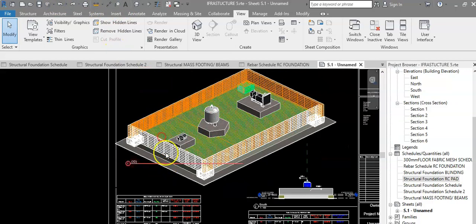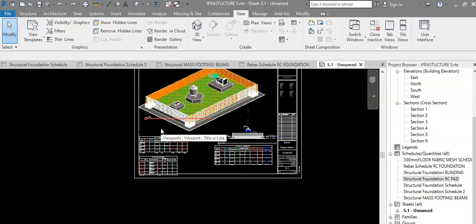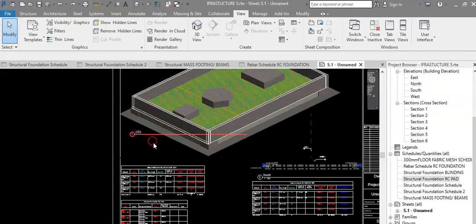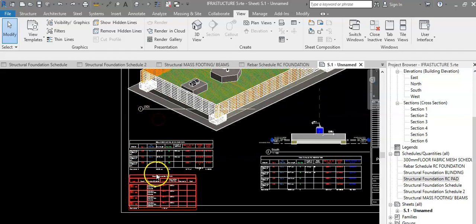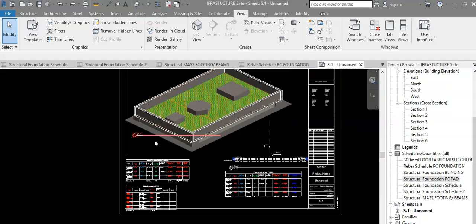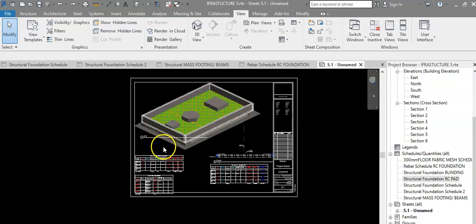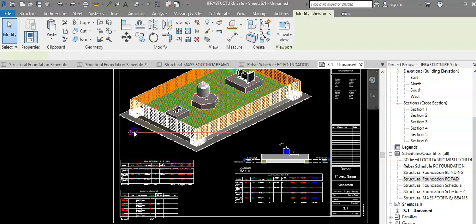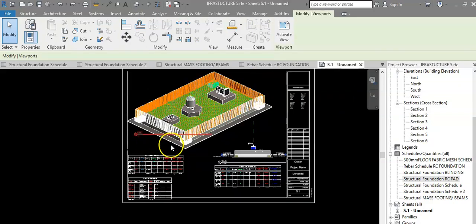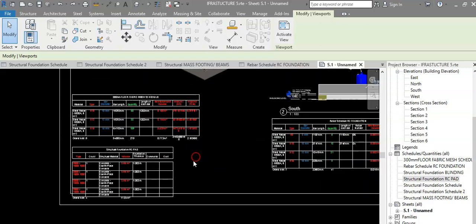Well, this will prevent recalculations and tracing all the new and updated drawings to update the schedules and volumes associated with it. So that means any member of the team, whether it's the designer, the engineers or the quantity surveyors who are using the model, any changes to any item will reflect instantly and dynamically on the schedule and volume of work.